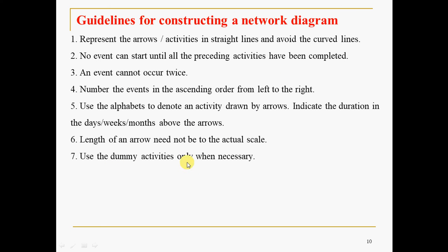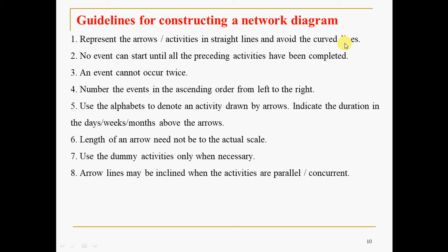Use the dummy activities only when necessary. Dummy activities are nothing but activities which don't require resources. Arrow lines may be inclined when the activities are parallel or concurrent. They should be straight, of course. They are not supposed to be curved lines, but they may be inclined when they are parallel or concurrent.